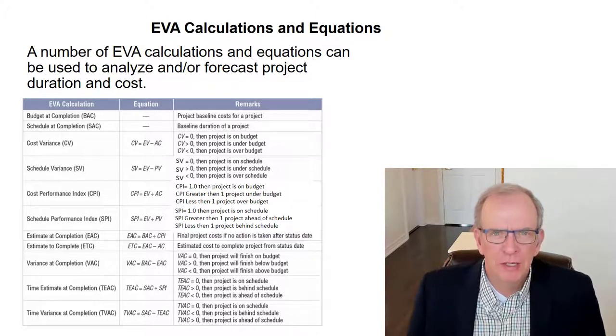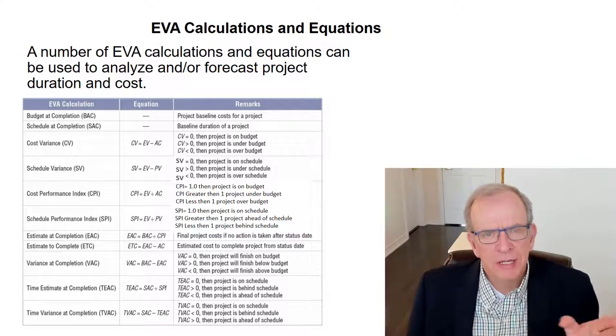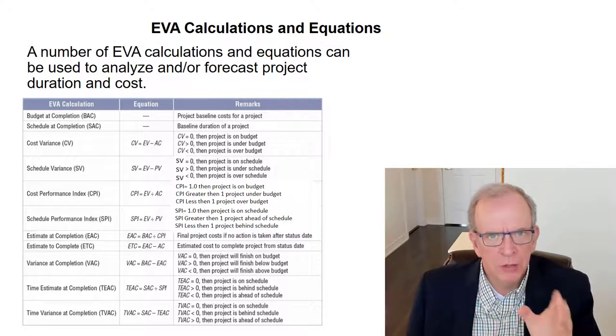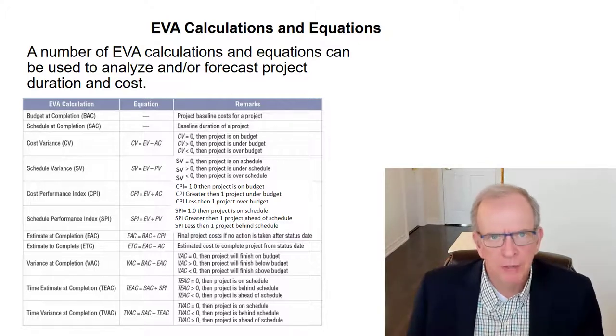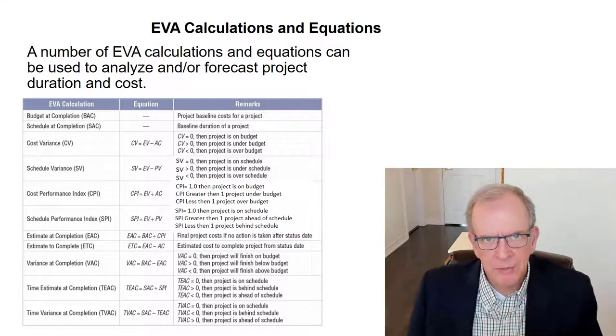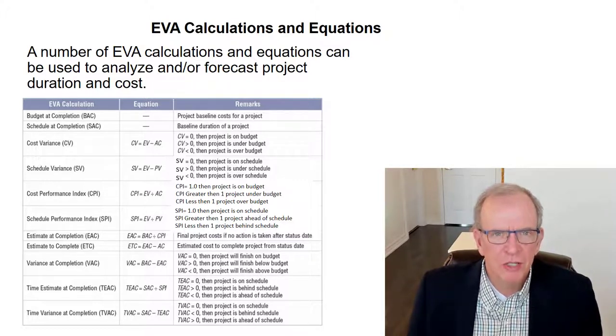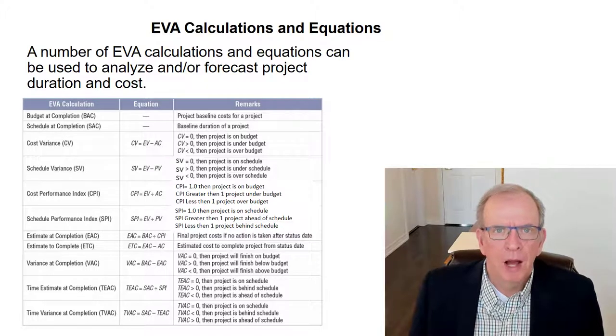If you want to get into technical earned value analysis, they'll say the schedule performance is underperforming. You could be underperforming in some of the activities that have float. So it doesn't necessarily mean it's exactly behind by the critical path date. You'd actually have to review that. And we've talked about that in the previous classes, the update process, seeing exactly how many days you're behind. But by and large it gives you a really good indication that you're behind schedule, more than absolutely likely in this case.